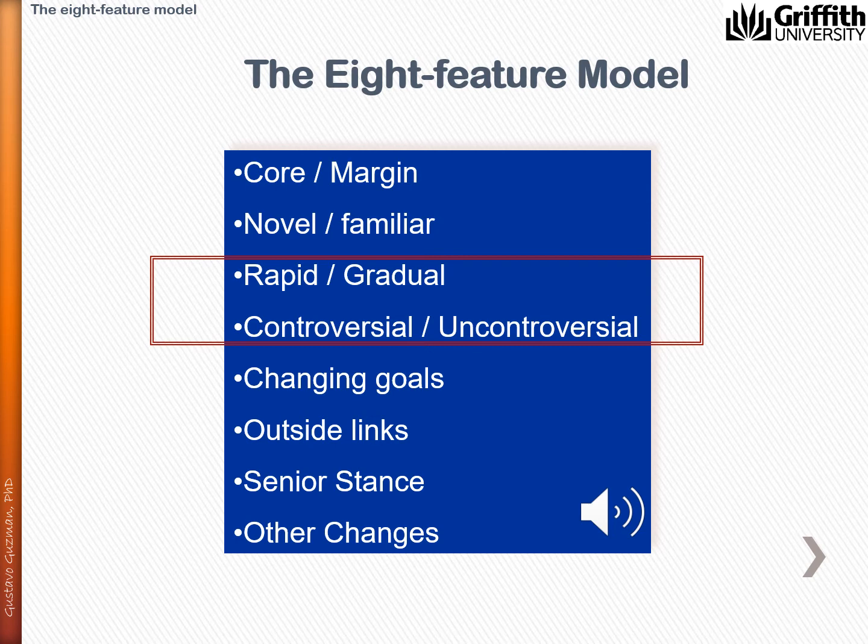Or projects that threaten established interests will also be very controversial because there will be a lot of people against the project. Similarly, projects that compete in resources or timing with other projects are controversial because you need to compete with different projects with other project managers.